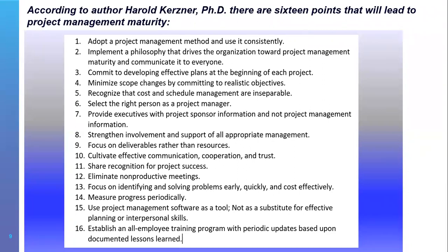And it's change request. I know customers always think, oh, you want money. It's for me not the main part. Yes, we want this too, but it's not the main part. The main part is time. If somebody asked me to develop 10 more reports than originally agreed, I need more time. I need more resources. I need more time. I cannot keep the go live date.